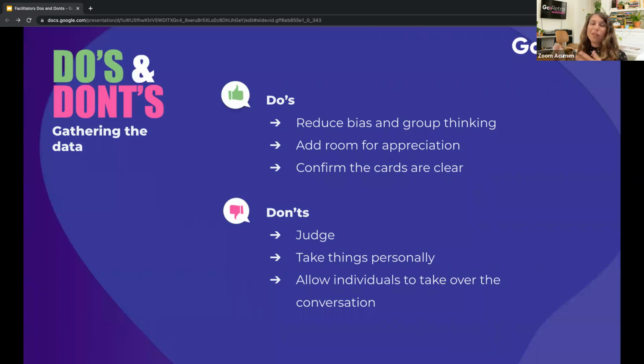If you're aware that someone usually takes over the conversation, it's easier to manage that. Try to get other people that are usually quiet to talk before the person that usually takes over the conversation starts talking, or even make sure you're limiting the time a person is talking. We do have the timer, which is not meant for that. I've heard some people use it. I think it's a bit controversial tactic, but keep in mind you have that as well.